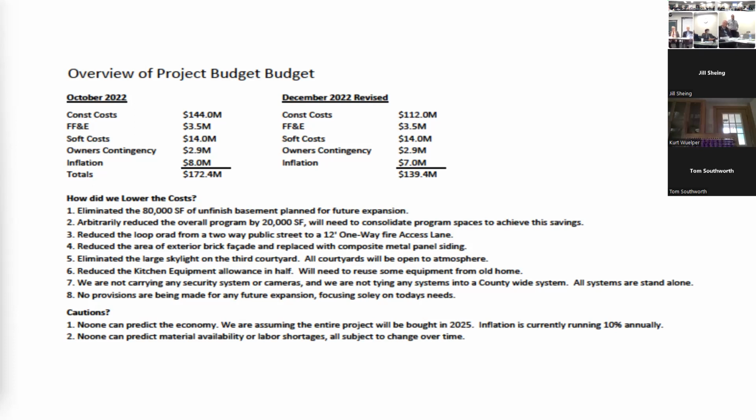We can certainly offer a number for the road come Monday. My question is about the fire department, because from years on the planning board in Rochester, I know the fire department in Rochester would never approve a 12-foot wide road around anything, because they won't drive their trucks on anything that narrow. It's got to be 20 feet wide. I think that's important to factor in. Maybe different circumstances, but we'll have a number for you come Monday.